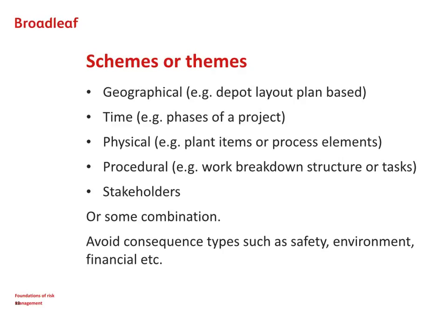We often also use stakeholder groupings as key elements. They are very effective. One thing we always avoid is using consequence types, for example, safety, environment, financial, as key elements, because risk is not normally related to just one of those. Risk leads to a range of consequences, and if we only consider risks in terms of the particular type of consequences, invariably we leave some risks out. It's called the cookie cutter syndrome.